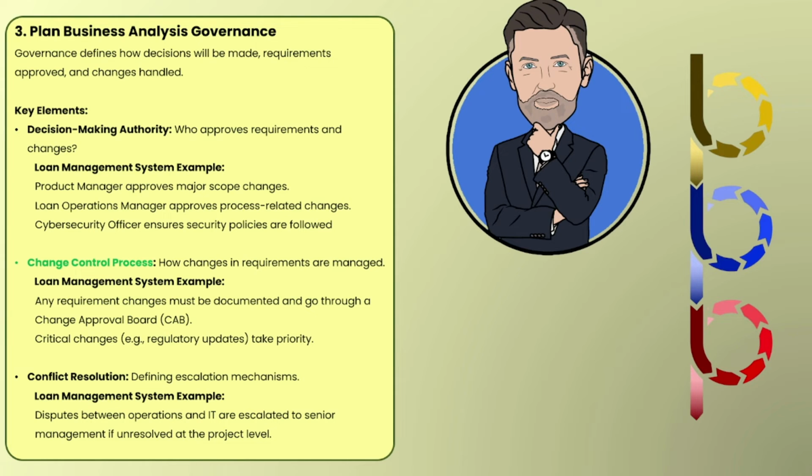Here, how changes in the requirements are managed. In loan management or in every other project, any requirement changes must be documented, and it goes to the change approval board, that is CAB.